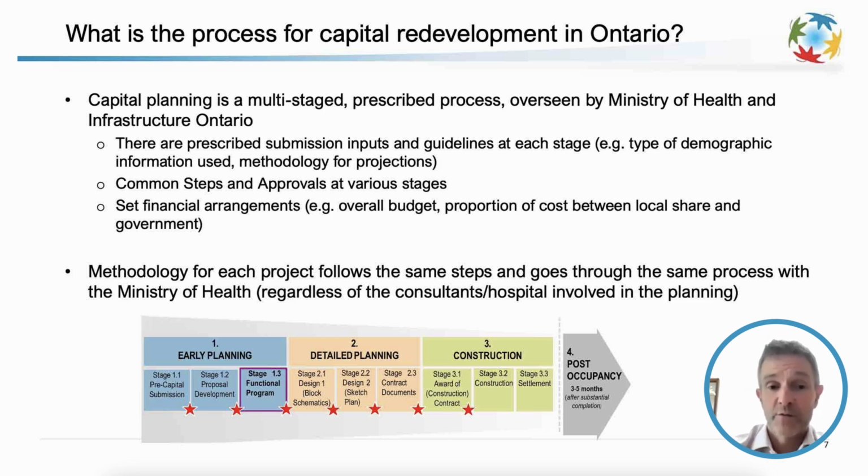And it's called stage 1.2. That's where you do the master plan and master program. Those are terms that are familiar to architects and municipal planners and that kind of thing. That's where we start to say, well, it's more detailed now, but we look at the state of the facility. The architects and engineers do that. So can the facility handle growth? Can you add a wing somewhere? Can you add floors above? Can you extend out and move the parking and that kind of thing?